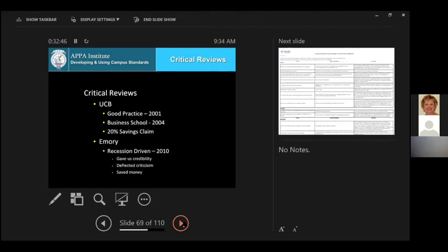And in the end, the developer made a whole series of recommendations, and we went to the dean and talked about the implications of those. So just by way of example, they had recommended that we have a thermostat in the faculty offices, one thermostat for every 10 faculty offices, as opposed to 1 per 3 faculty offices in our standards. And so we knew the implications of that. Our highest volume of work orders was hot and cold calls, and you can put 3 different offices together, and 3 different occupants of those offices will have 3 different desires for temperature. One will want it hot, one will want it cold, one will want it medium. And so we told the dean, if you decide to go with 1 per 10, you're going to see a multiple increase in hot and cold calls.